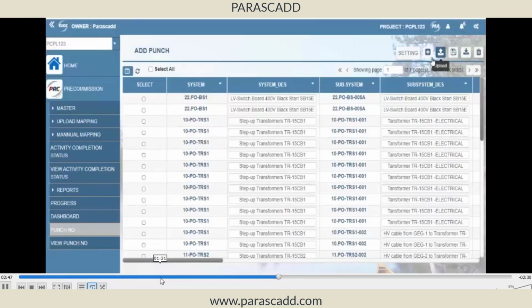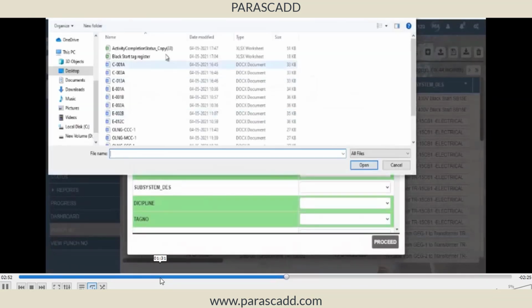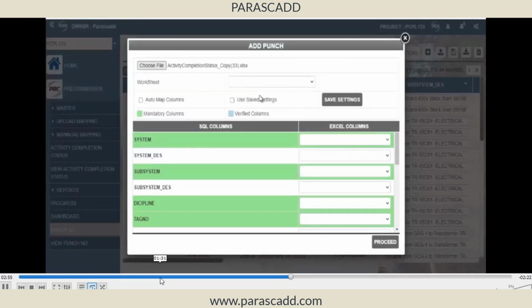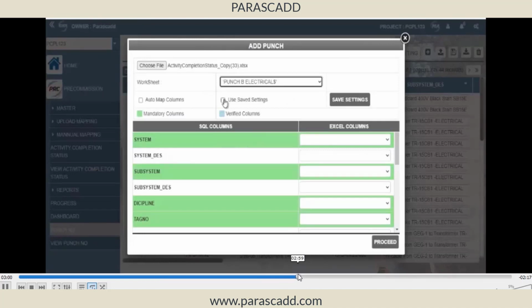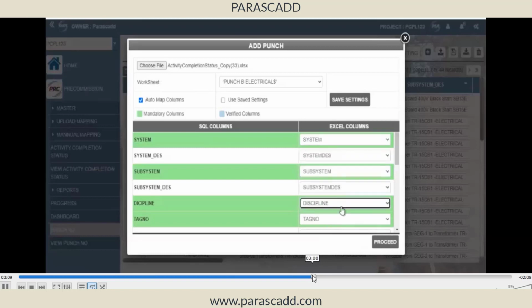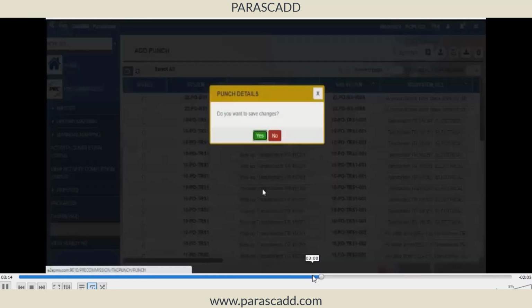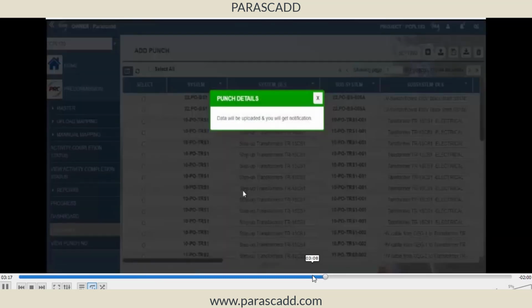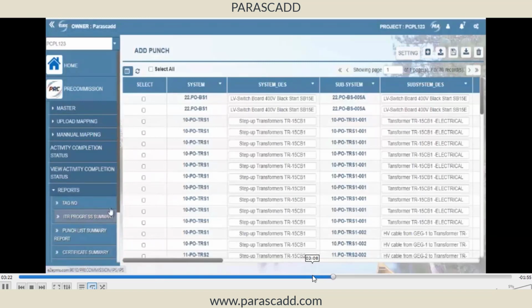For approval, there will be special rights. The inspector can log in and then he will give approval. He will cross verify the attachment, whether the signature is his own signature, and then he will give approval so that the things will be locked here. So it's a two-step process, but if you want, then we can lock it also. It is against a particular login. I can give both the rights. You can attach and then you can approve, right? Or alternatively, I can give the approval rights to the inspector only. So we are controlling things using login rights.